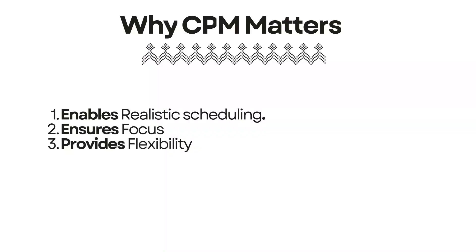So why does the critical path method matter? Understanding your project's critical path gives you three major advantages. Firstly, it enables realistic scheduling — the critical path tells you the minimum time needed to complete your project based on the sequence of activities. Secondly, it ensures focus, so instead of treating all activities as equally important, you can concentrate your attention and resources on critical path activities. And lastly, it does provide flexibility. For activities not on the critical path, you have wiggle room — this lets you shift resources or delay non-critical activities when necessary without compromising your deadline.